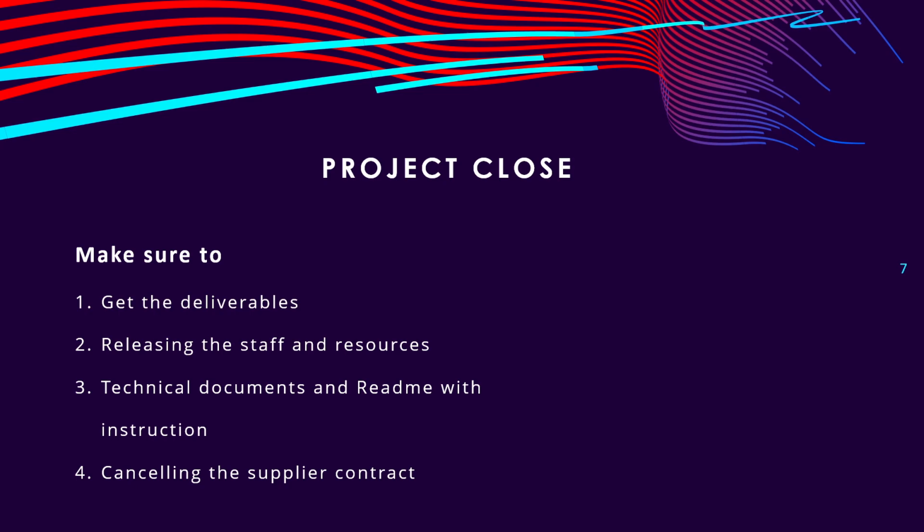I will recommend you to actually start at least 1 month before the contract or the project is going to get completed. So you will get time to see the people and hire a good technical team who will be continuing the project. This team will also get some time to actually see what your project is, and they will be able to study it. They will be able to get the entire technical documentation and go through it, or if anything is missing in terms of technicality, they can again revert back to you.